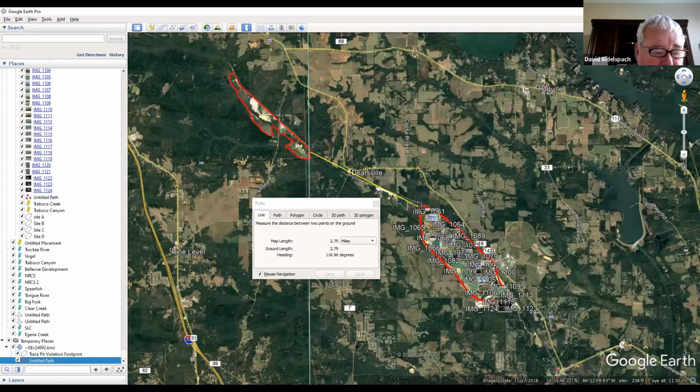And the reason, Dave, why I'm not moving forward with any reports except the geomorphic one is because what I'm trying to do is get US EPA to agree that we don't have to do this floodplain connectivity for the entire length, because there are sections where we're not doing anything and we're not trying to encourage floodplain connectivity. So I don't want to be analyzing stuff that doesn't matter. You know what I mean?